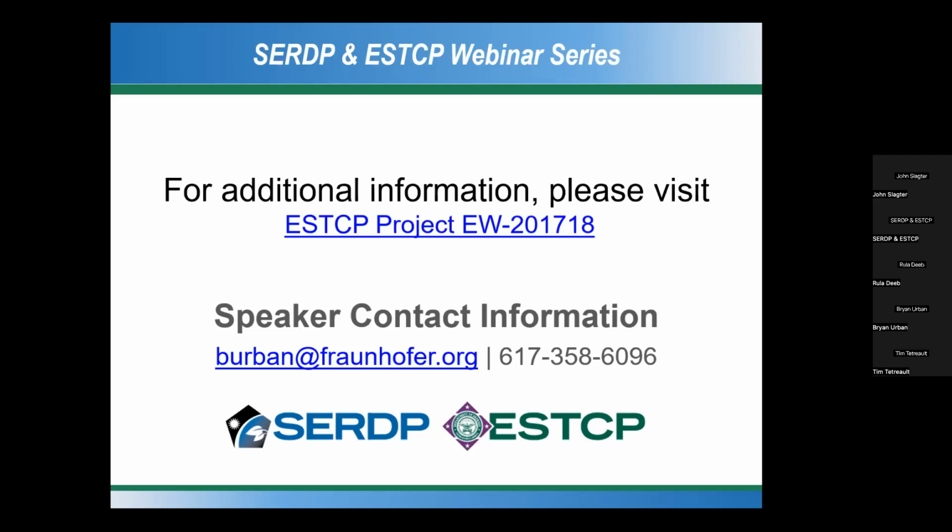So once they fully understood what we were doing and what it was, a lot of the things were relatively easy to overcome. And the wireless example was a really good one. Once we worked with the Spectrum office at the base, they wanted some information. We gave them basically the FCC IDs of all the wireless radios used in the project, and they were able to look up the frequency and all that stuff.